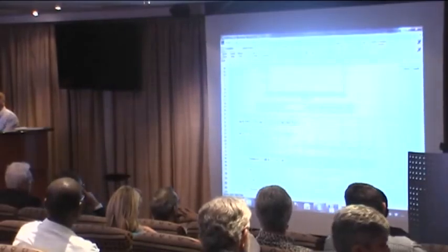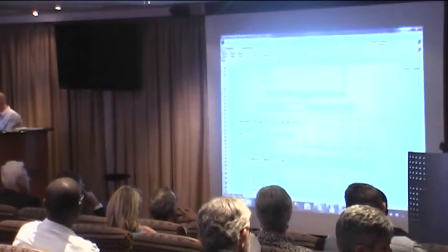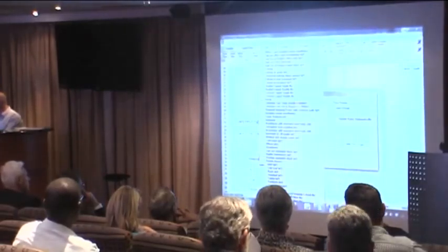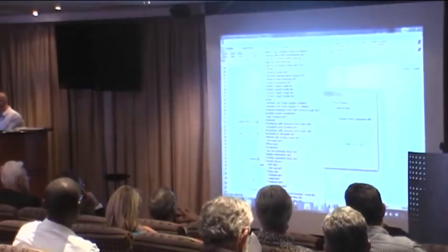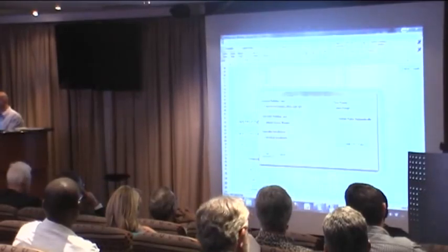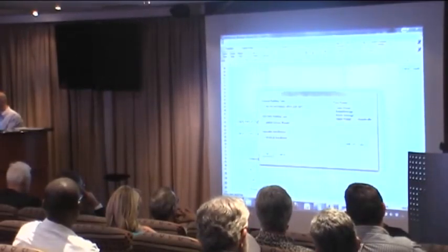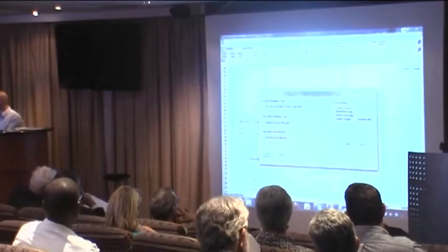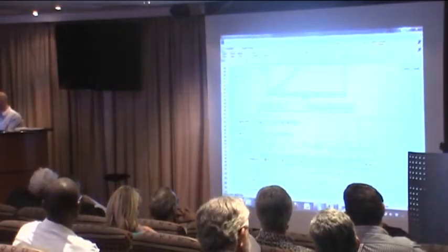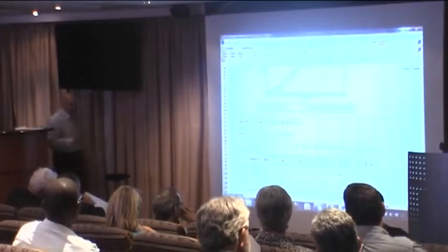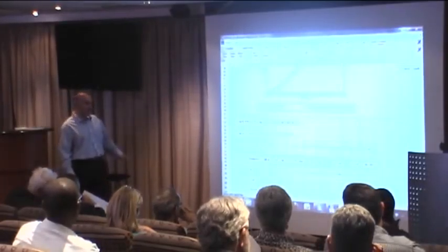If I don't know how much a block of offices is going to cost per square meter, I can say look up cost, and I can go through and say, right, I want a low-rise prestigious office building, and what range am I looking for, below average or lower range or above average? Let's say below average, click OK, and the system prices, interrogates, and applies a rate per square meter.